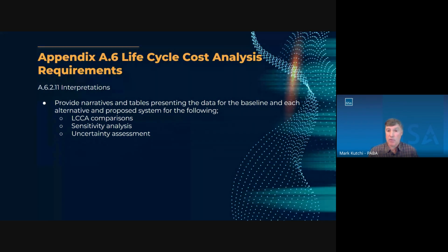Interpretations: the life cycle cost analysis should include narratives and tables providing the life cycle cost analysis comparisons, a sensitivity analysis, and an uncertainty assessment.